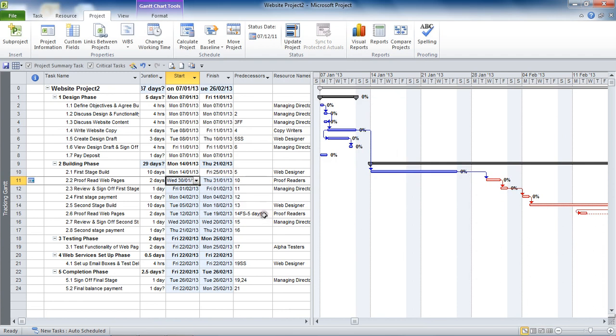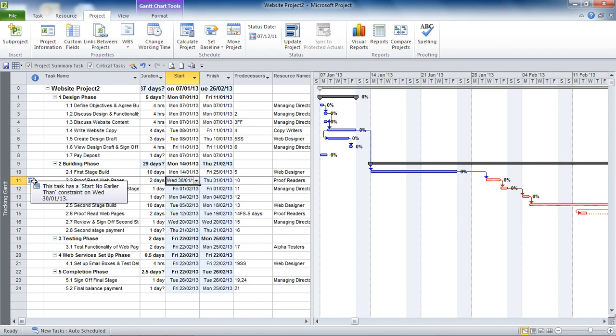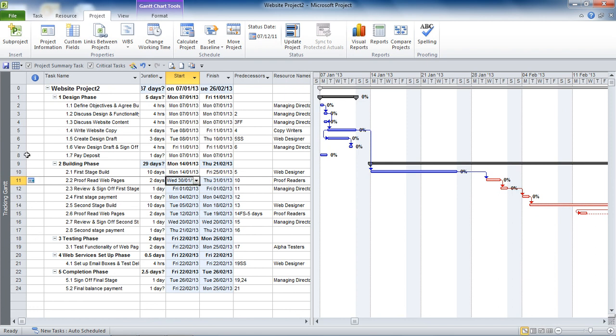What Project will do is it will create this constraint. I can see the constraint indicator in the indicators column, start no earlier than constraint, possibly the most common constraint that gets used. But really what I'm trying to demonstrate here is that you shouldn't touch the start or finish dates of an auto-scheduled task. It's a really common thing to do for people just getting started with Project, very common to do that. And you'll see these indicators, these calendar icons, just filling up this indicators column for where people have done that, not being aware of what they're doing.